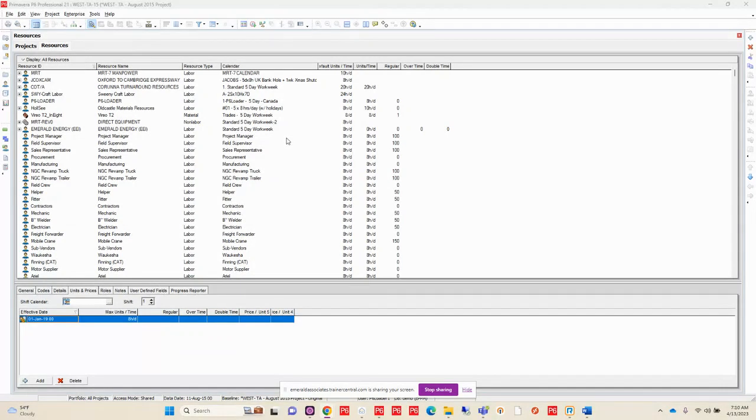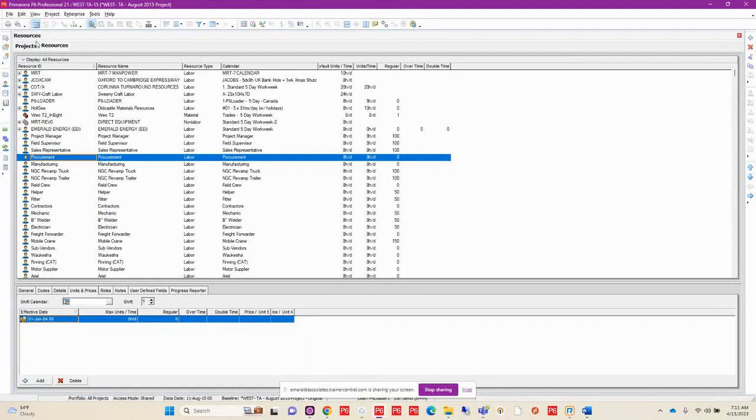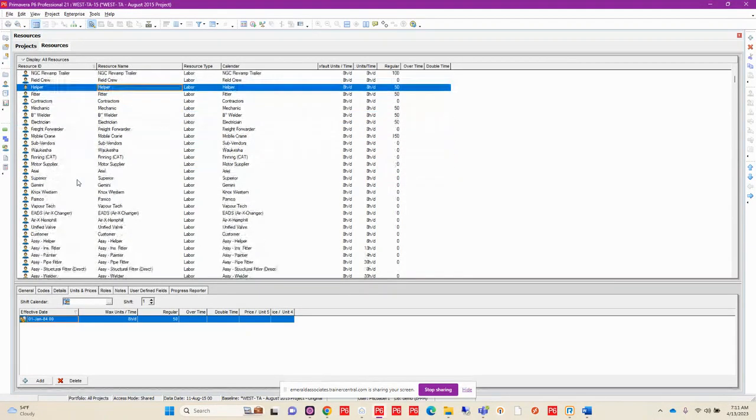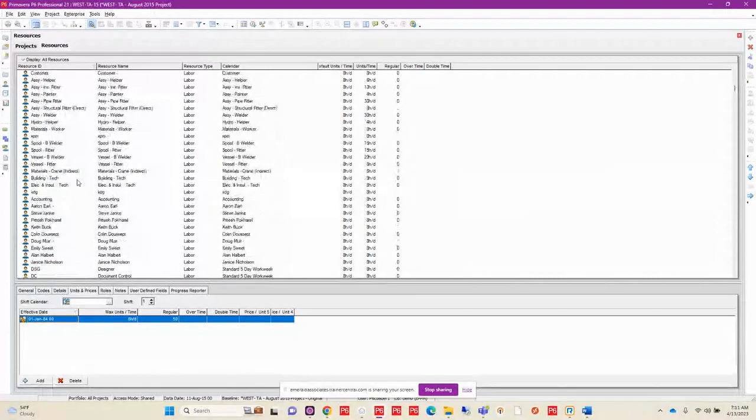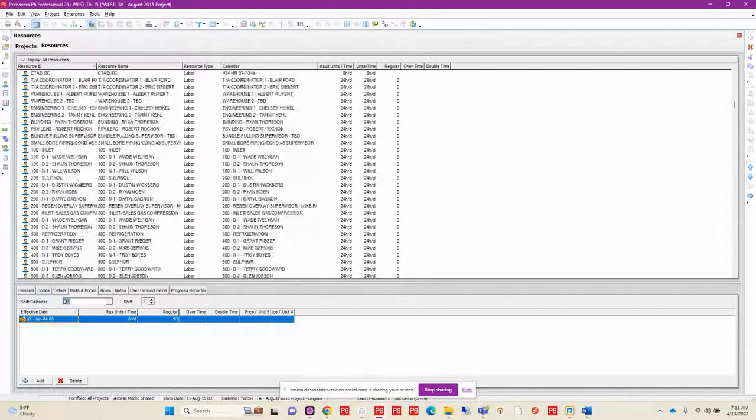When you are importing and you have resources that are coming in, what you can see is that if you don't have a place for those resources to fall, they start to just be added to the end of your dictionary. So you can see these ones down here that are not in a hierarchy or anything, and they go on forever. These are resources that were imported with a file without having anything defined as to where they were going to land.